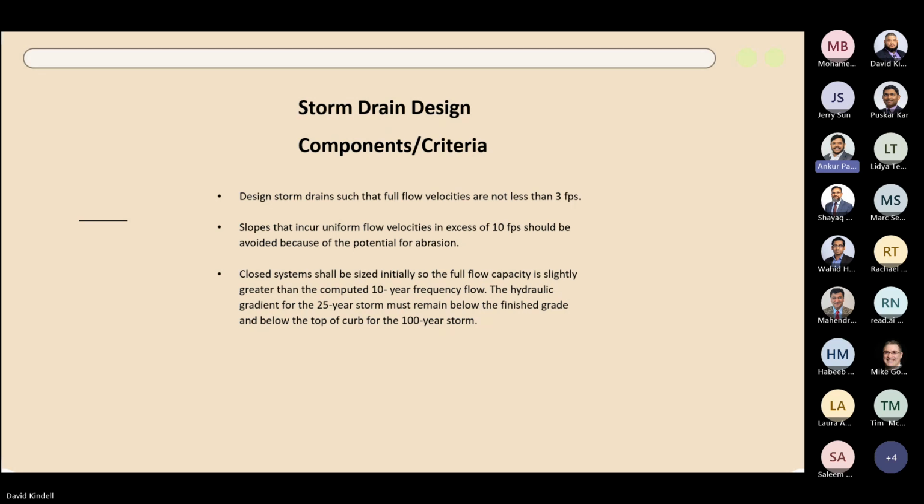I think MDOT could do a better job of only requesting them for pipes that are after a certain year of service life. I don't know, they would make it up, but something like 25-year-old plus pipes need to be VPI'd. But right now they're just giving us blanket rules. So it depends on the case. If we have as-built, maybe that's an argument point we can make, that if it's a newer system, they don't need to waste the money to do that.